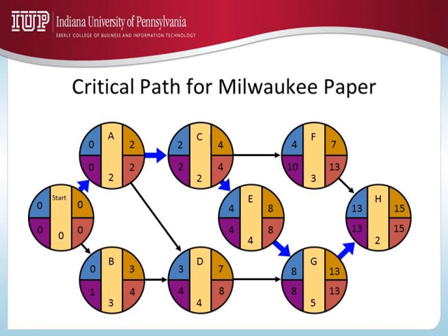Now, if you are not clear, listen to this again one more time. Once you have done that, let's observe. Do you recall when I looked at the 4 paths in this particular network? It was ACFH, ACEGH, ADGH, BDGH. Which was the critical path? ACEGH.